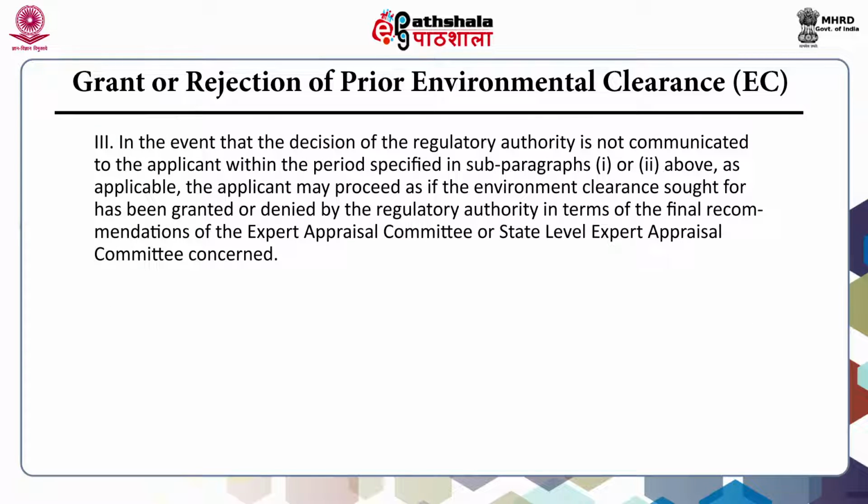In the event that the decision of the regulatory authority is not communicated to the applicant within the period specified in the subparagraphs 1 or 2 of this notification as above, as applicable, the applicant may proceed as if the environmental clearance sought for has been granted or denied by the regulatory authority in terms of the final recommendation of the expert appraisal committee or state level expert appraisal committee concerned.